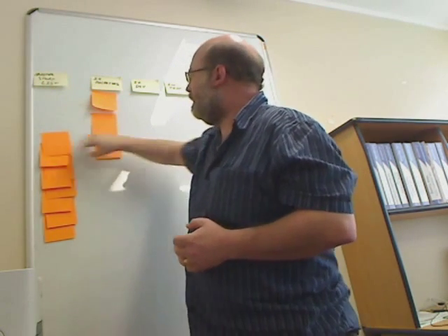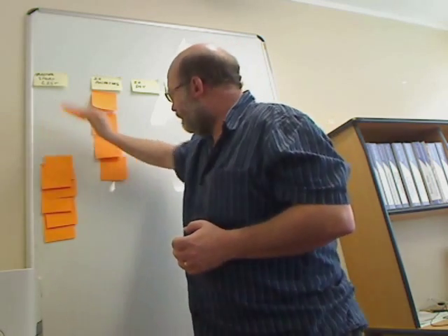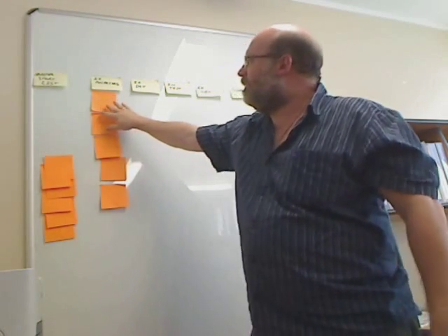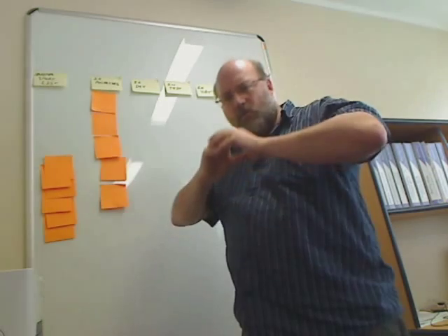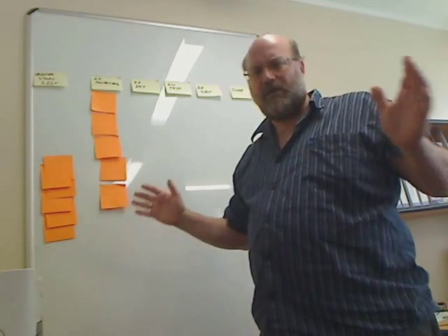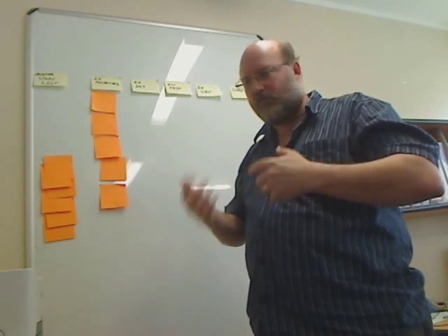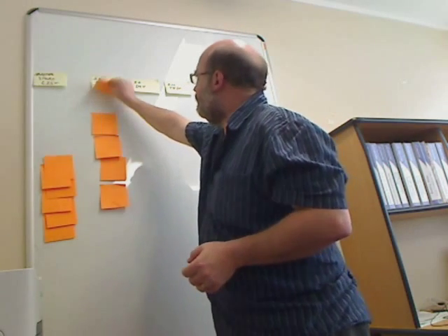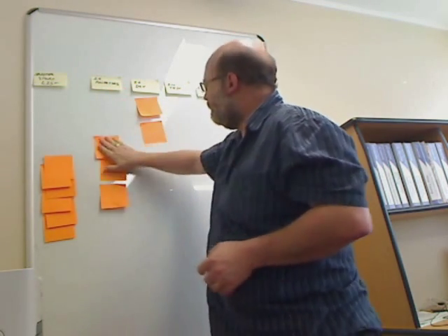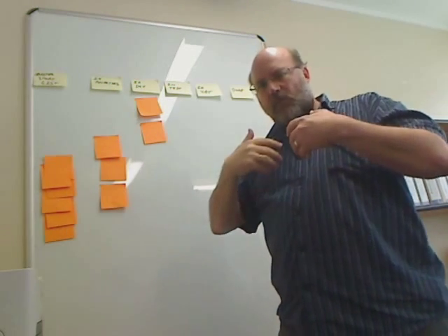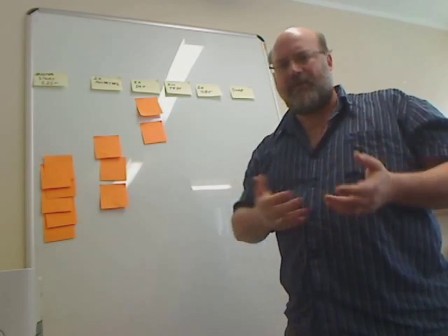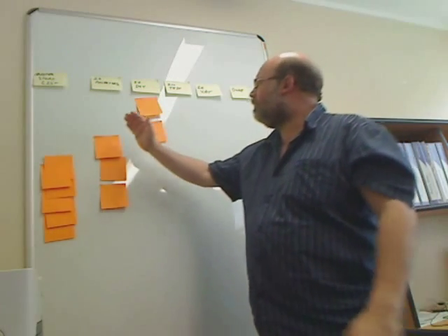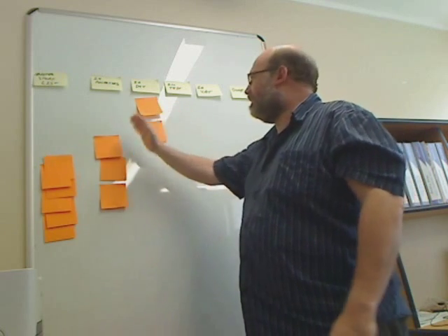So let's say we've got these 5 stories that we've agreed are the current most important set of work. It's quite likely that in reality, in the previous iteration, 1 or 2 of these will have already been elaborated into quite a lot of detail so that developers can start work and the testers are already designing the test cases. So we'll say these stories are in development, these ones are in analysis, and on the daily stand-up, each team member reports their current state against the work that they're doing, and we record the movement of stories from one state to another.